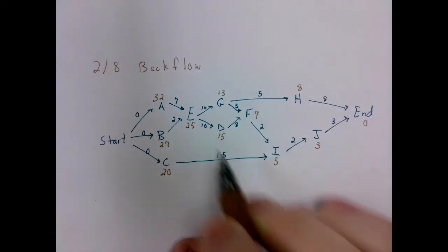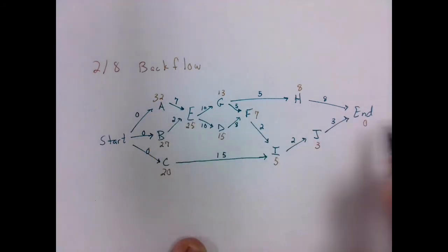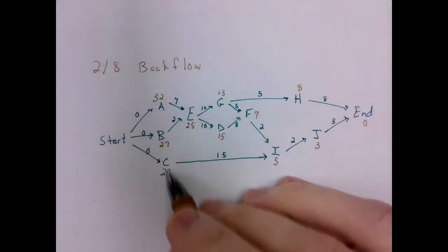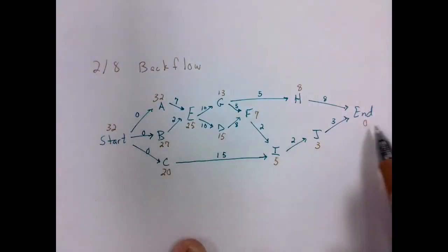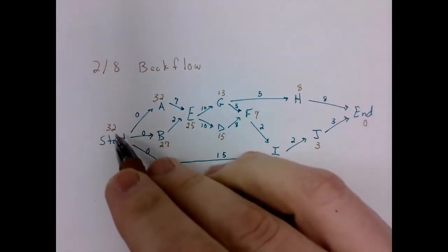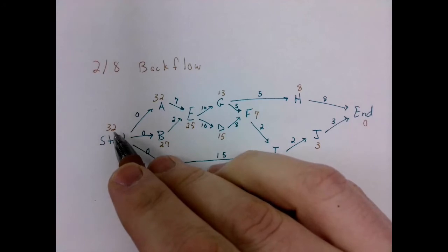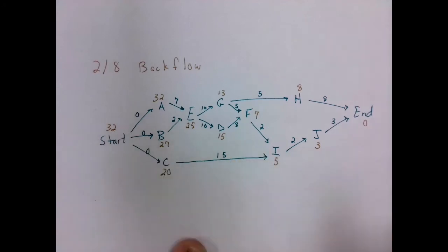So what this tells us is that the shortest time we can complete this project is 32 days, because that is our highest number. So we must start 32 days prior to when we want the project to end. You'll notice this is the same number that we got when we did our critical path analysis as well. Alright. Just to walk you through critical path analysis one more time. This is the same example, so if you understood on Tuesday, you can stop the video.